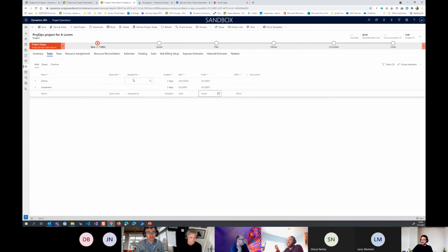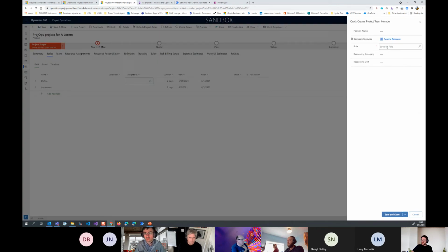And as a project manager, what I'm going to do is assign what's known as a generic resource on these tasks, because I don't know who's going to actually deliver this project just yet. Remember, we're building that contract. We're not managing the project just yet. So what I'm going to do is create a generic resource. So that's a placeholder.